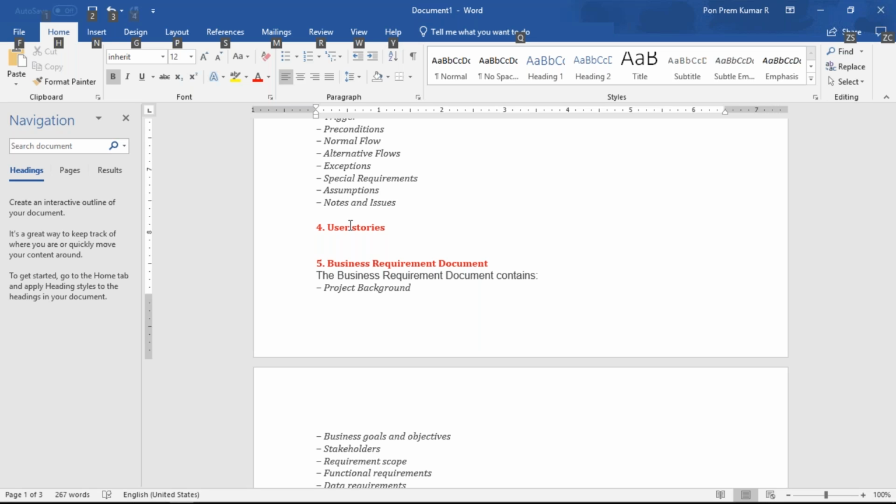You have to choose a user story that developers can complete within the sprint duration. Say your company follows a sprint duration of 1 month; that duration includes both the work of the QA team and the development team. The development team may take up to 3 weeks to complete the development, and the final work will be assigned to the QA team.